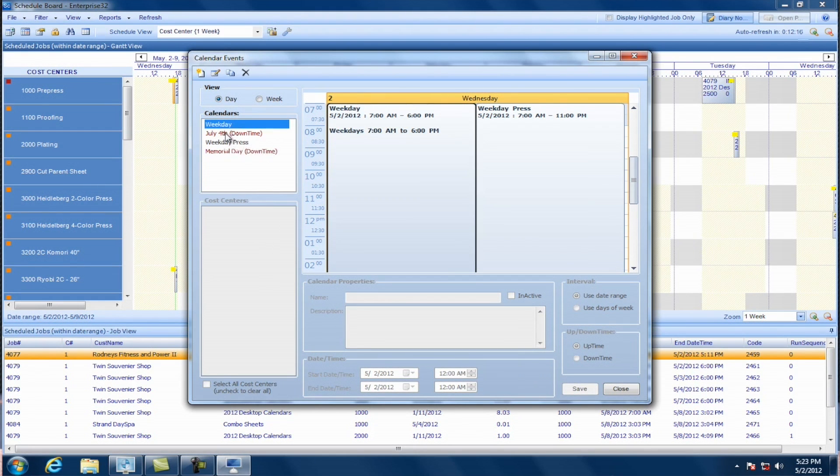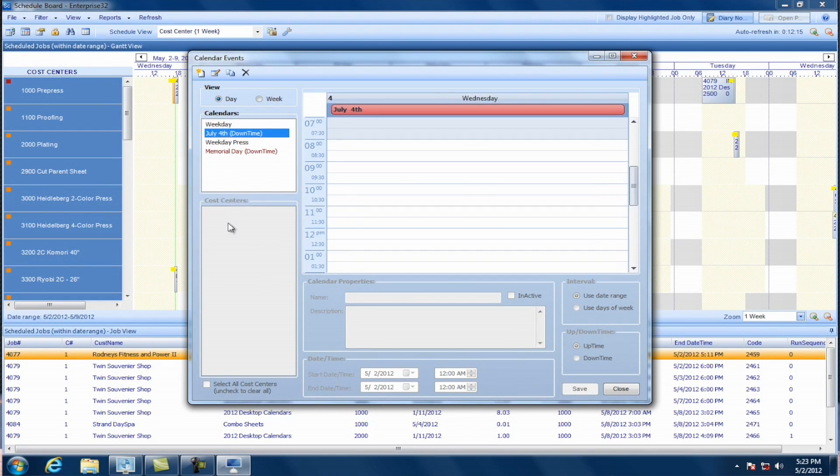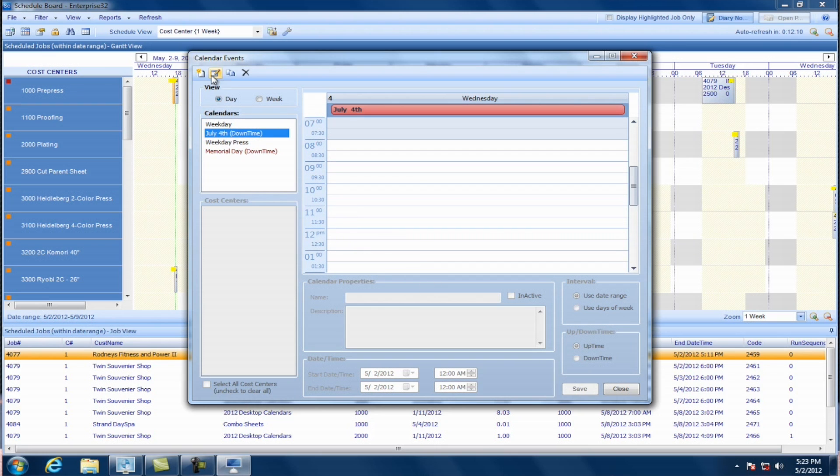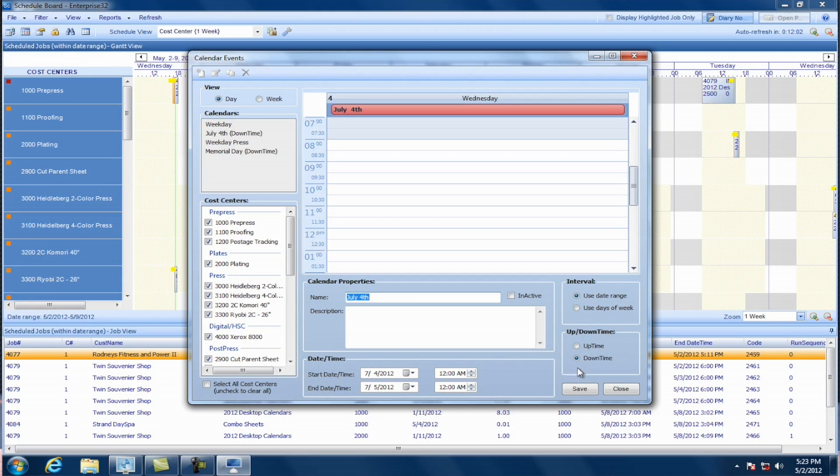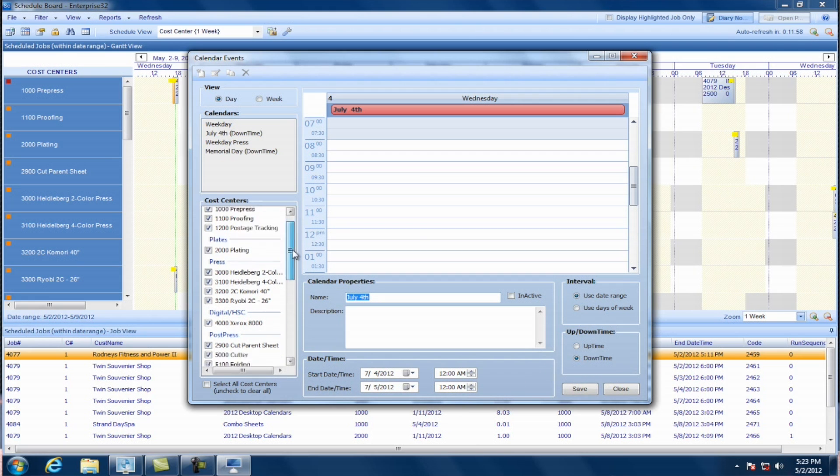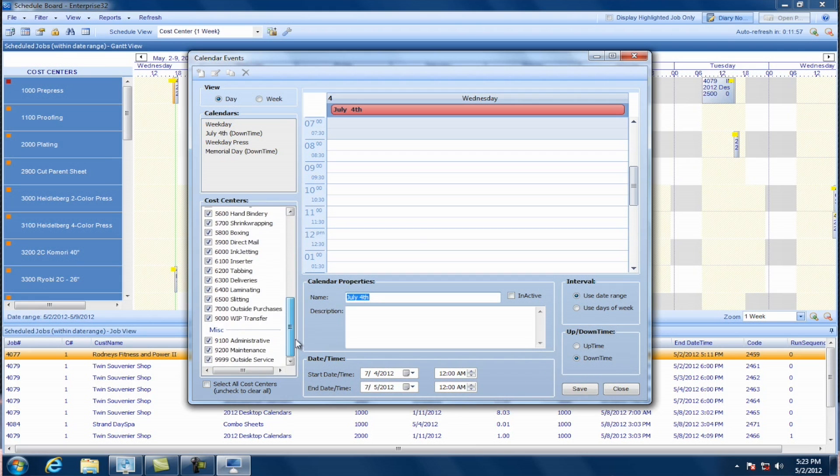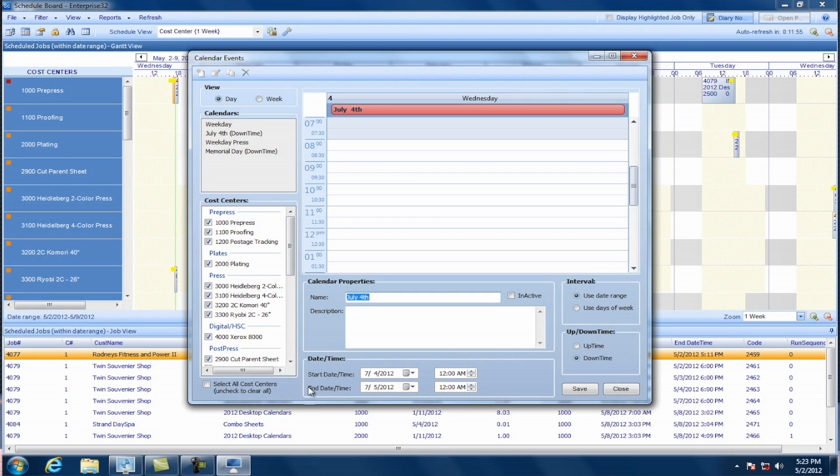So that's an uptime calendar. I could also have a downtime calendar, for example, for July 4th. If I edit that calendar, you'll see I've checked off the option for downtime. So a downtime calendar would be mostly for things like your holiday schedules. So in this case, I've selected all of my cost centers because this is when the plant will be shut down. And I've put in a start date of July 4th to July 5th from midnight to midnight. Okay. So in that case is when I would use a date range.